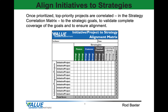Now that the work of prioritizing the initiatives and projects is complete, it's time to align the initiatives and projects with the strategic goals and objectives. The alignment element is intended to determine if there are any gaps between the prioritized initiatives and the strategic goals. If gaps exist, then additional or different initiatives and projects must be identified and selected to eliminate the gaps and ensure successful achievement of our strategic goals.